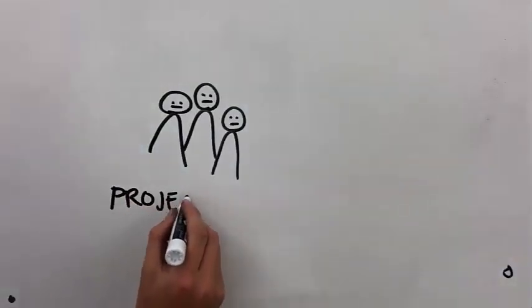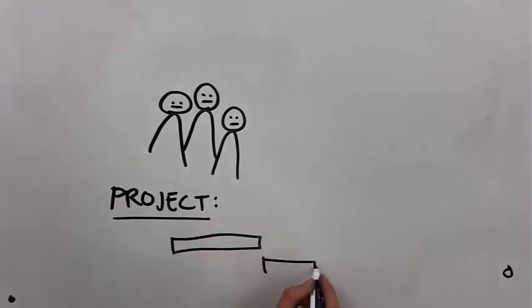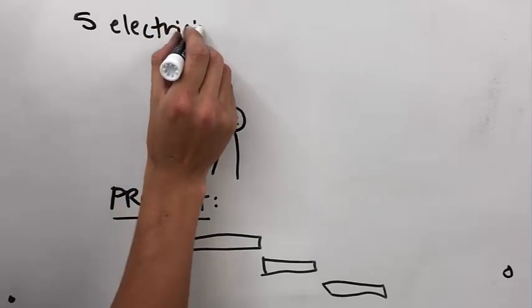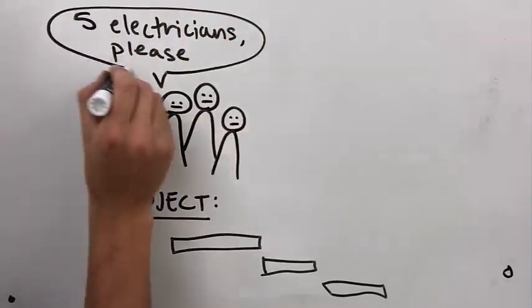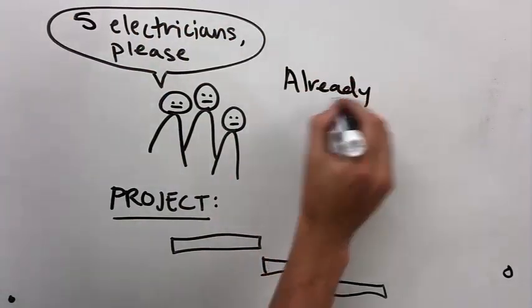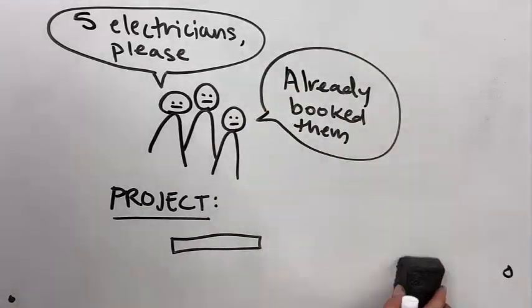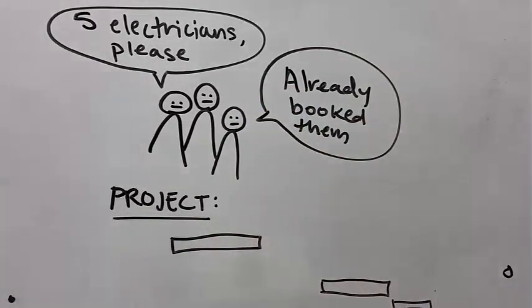The production planners at Northrop Grumman have expressed concern with this current method of scheduling. Manually shifting these tasks is a labor-intensive process prone to errors. Resource conflicts amongst schedules from various divisions emerge frequently, and it is the responsibility of our client to shift tasks around the timeline in an attempt to level resources and keep all projects in accordance with deadlines.